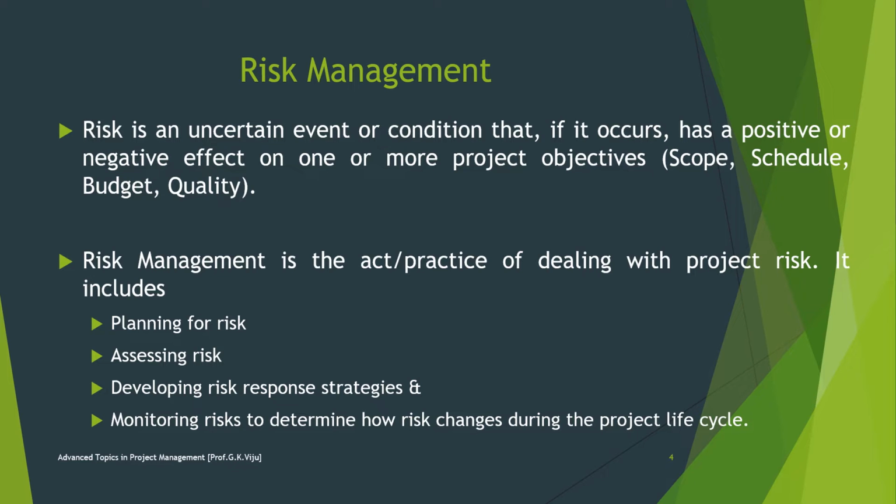So a risk can be termed as any uncertain event or condition that might affect your project. Not all risks are negative. Some events, like finding an easier way to do an activity, or conditions, like lower prices for certain materials, can help your project. When this happens, we call it an opportunity, but it's still handled just like a risk.